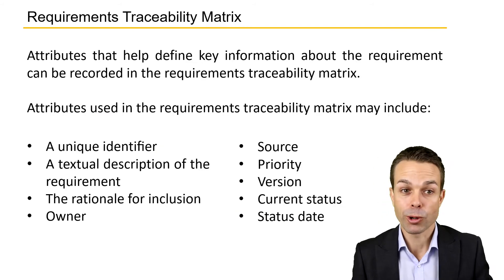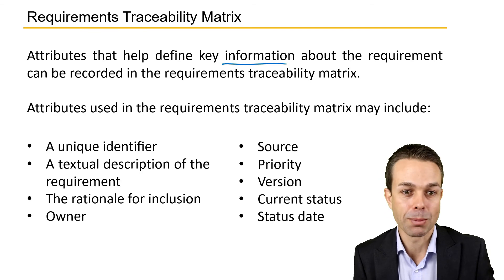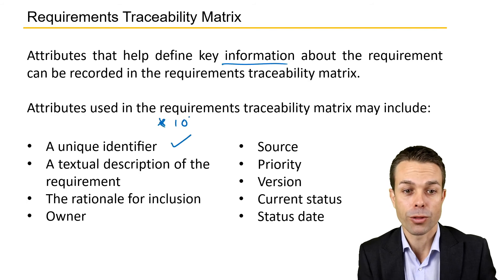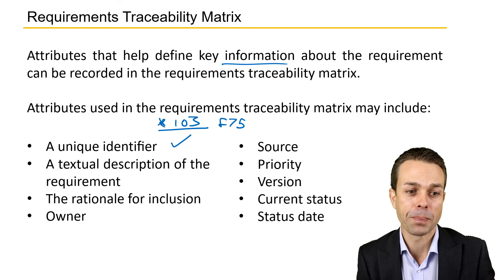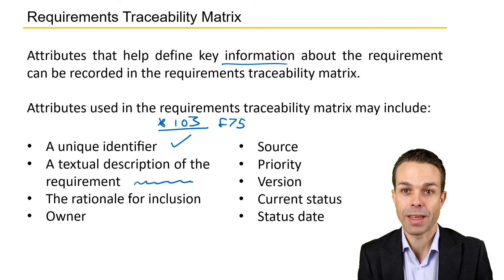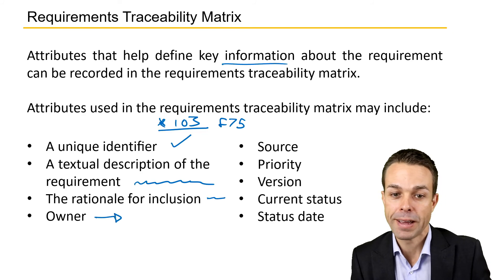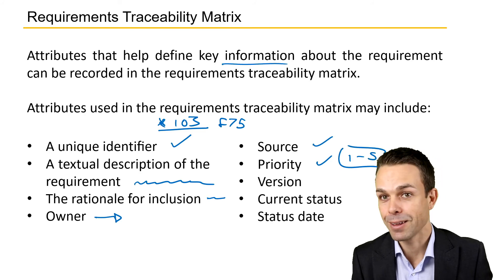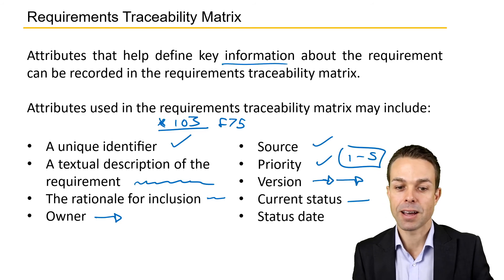There are a few attributes we'll put into this Requirements Traceability Matrix that will help define key information about those requirements. These attributes include a unique identifier — for example, number 103 or F75, whatever makes sense for the project. A textual description of that particular requirement, the rationale for its inclusion, who owns that requirement and where it came from, the priority — one to five is usually a good measure — the version of that requirement or deliverable, and the current status and status date.